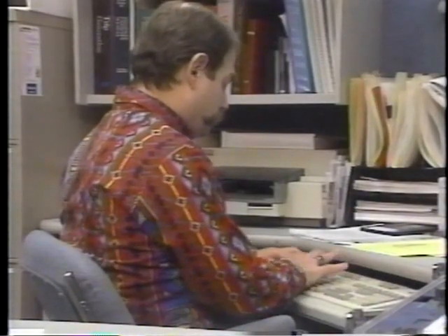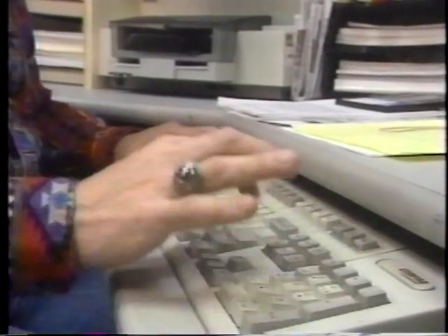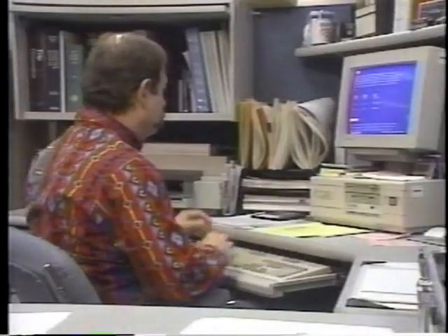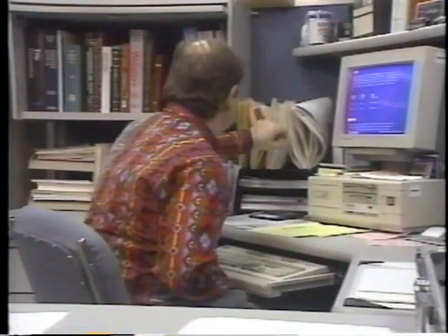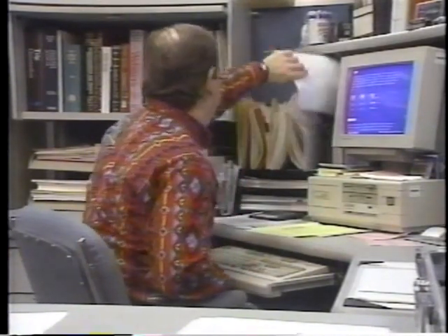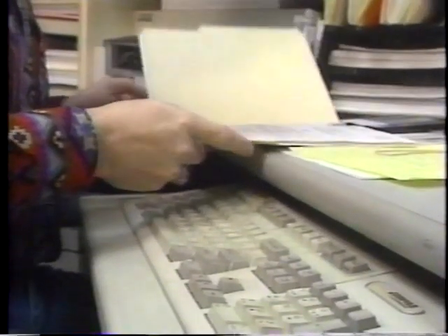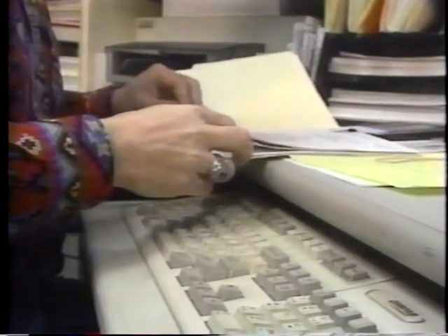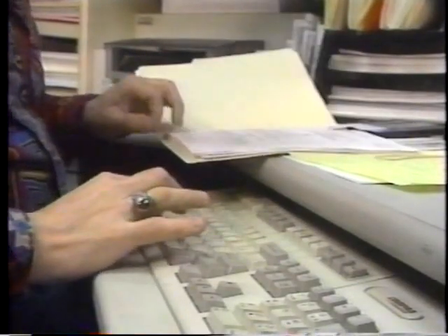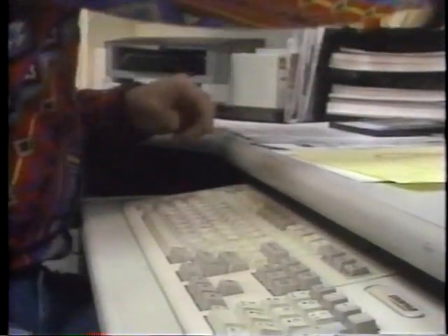There are many variables in construction. It is not practical to plan for all the variables. So planning values, even with the use of additives, do not have to exactly satisfy the manpower requirements of an individual contract. Final adjustments to manpower requirements among the contracts in a district can be accomplished through scheduling techniques.